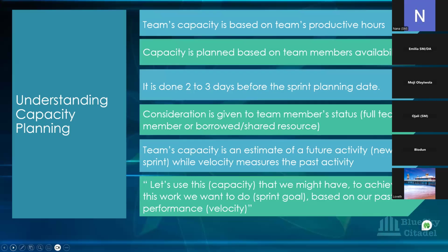So if you have both an ADM and a Scrum Master in your team, the ADM would expect you as a Scrum Master to do it a week before, because she needs that information to work with other team members that need to align with what the team is going to work on. So that's how Scrum Masters and ADMs can collaborate together. And if you're one person doing both, it makes it easier, because you're just one person wearing two different caps, so to say.